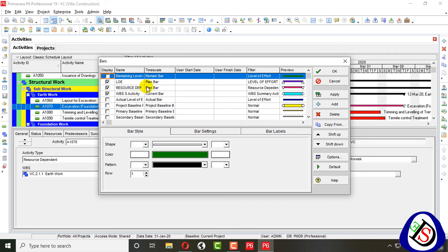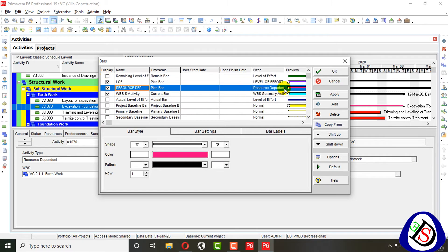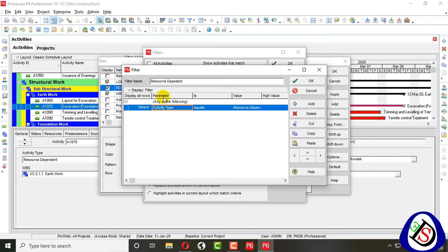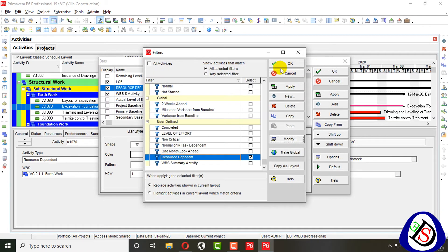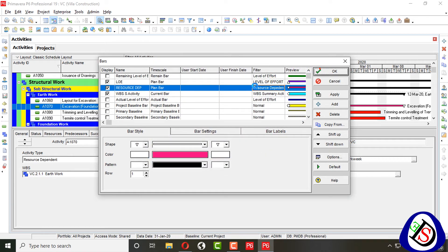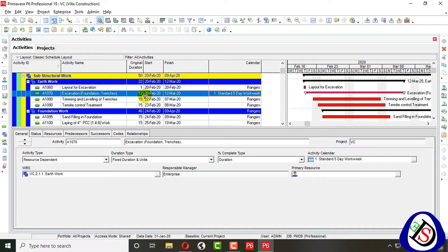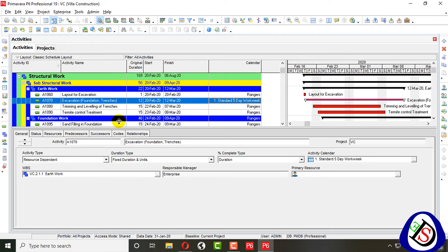When I apply this calendar and change the activity type to Resource Dependent, you can see the bar changes. I assign new bars for Resource Dependent, change the preview, and apply a filter for Resource Dependent. You can see this activity now shows a duration of 12 days after scheduling, because the resource is dependent on the five-day calendar and the bar has changed accordingly.